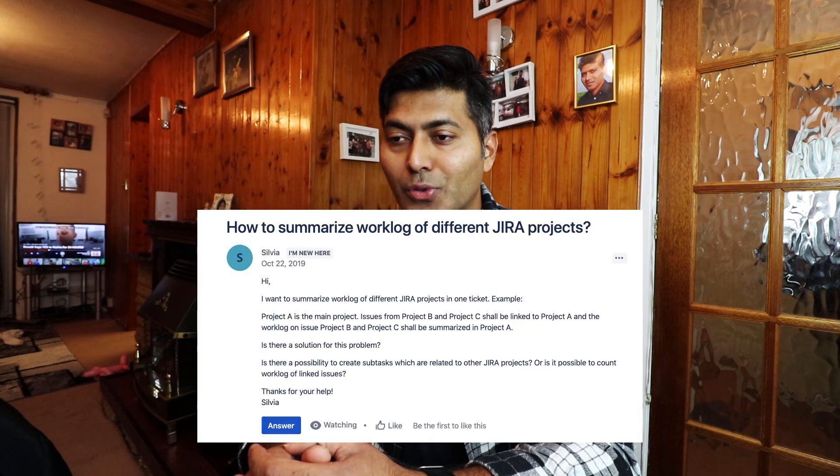Do the upgrade first on a staging instance, then ask your stakeholders or UAT candidates to verify and validate that the upgrade has not caused any problems — confirming that all features and customizations are working.